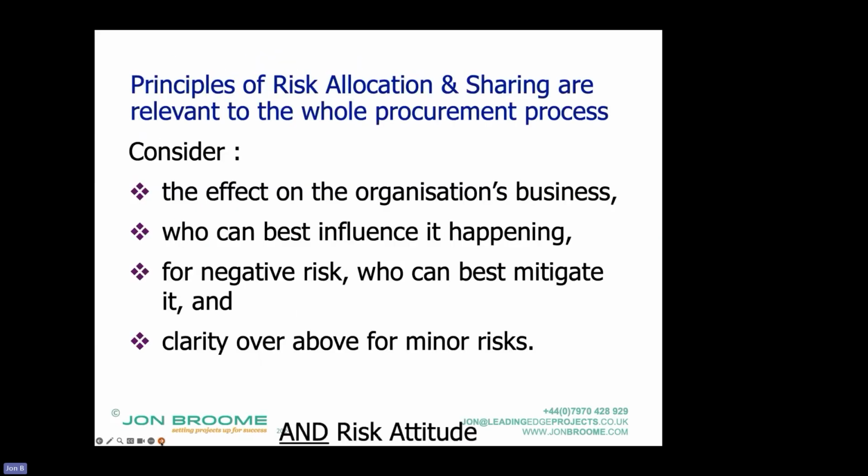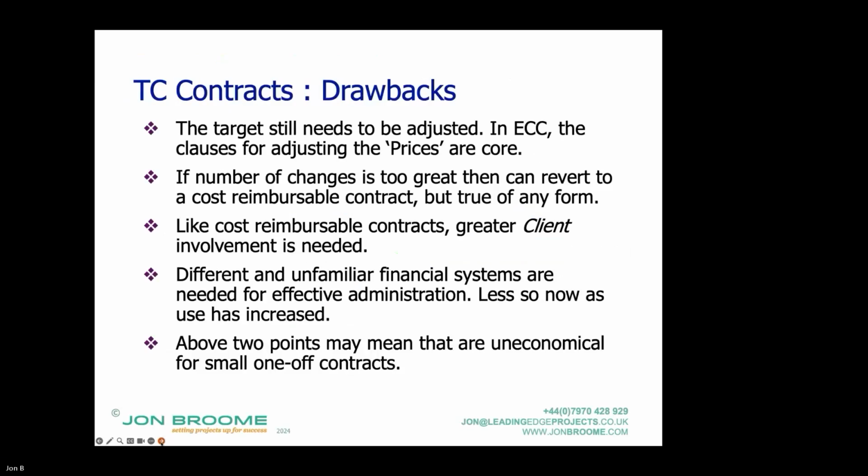So one of the things is it does create the motivations for cooperation and collaboration, but that does mean that someone's got to be there to cooperate or collaborate. One of the areas where they should be used is where both parties can contribute to the risk and uncertainty within the prices. So going back to my Sheffield Inner Relief Road, that's a prime example.